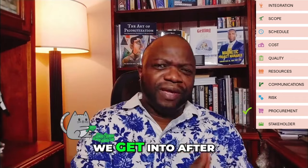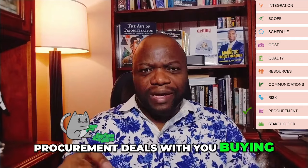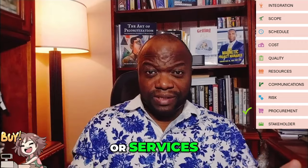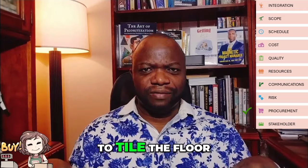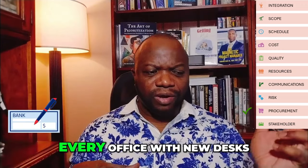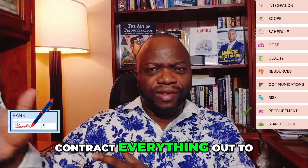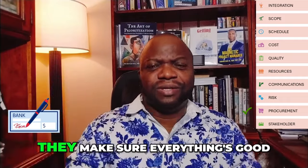The next one that we get into after risk is procurement. Procurement deals with you buying, purchasing whatever you need outside the firm. And you could purchase goods or services. Maybe you get someone who's good at tile to tile the floor. That's a procurement. Maybe you are equipping every office with new desks. That could be a procurement as well. Or maybe you just contract everything out to one person. They buy the desks, they install the desks, they make sure everything's good.